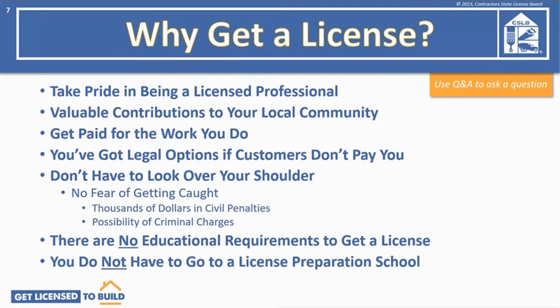Next, it allows you to get paid for the work that you do. There is value to the work done by a licensed professional. Being licensed also gives you legal options if customers don't pay you. Unlicensed contractors do not have a legal right to take someone to court to get paid because the work required a license and they weren't licensed to do the work in the first place. Also, you would be able to use the mechanics lien laws.